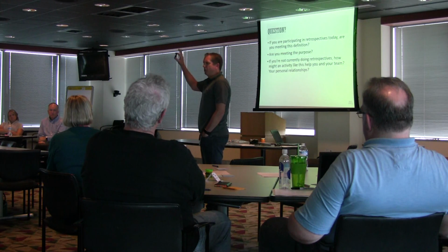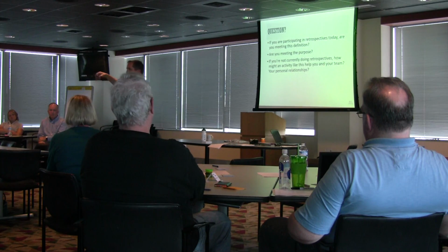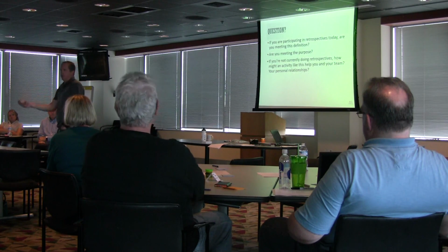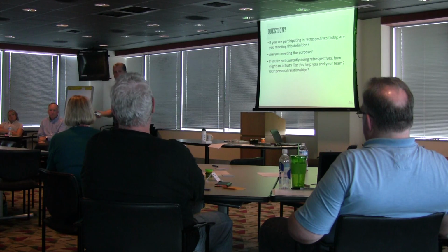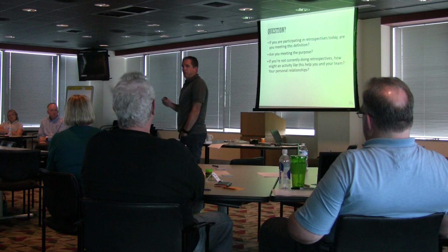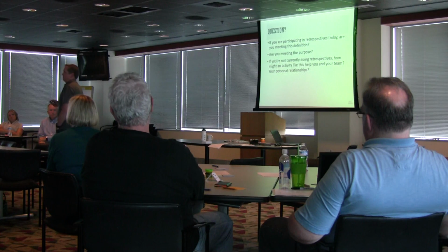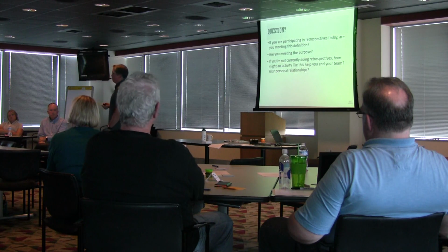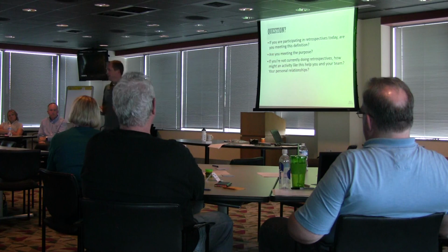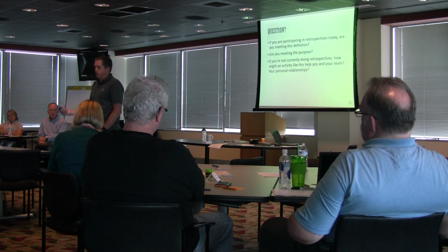Yeah, how many of you bring up, so we had a retrospective, we talked about having better communication. We committed to doing something, we had a plan around that. We articulated what better communication looked like. And then came to the next retrospective, how many of you review that and say, all right, here's what we said we were going to work on. How did we do, guys? Right? Because that's the other piece. If we're not doing that, then I start to question, why are we even doing a retrospective? Right? I want to make it valuable for each and every person in the room.